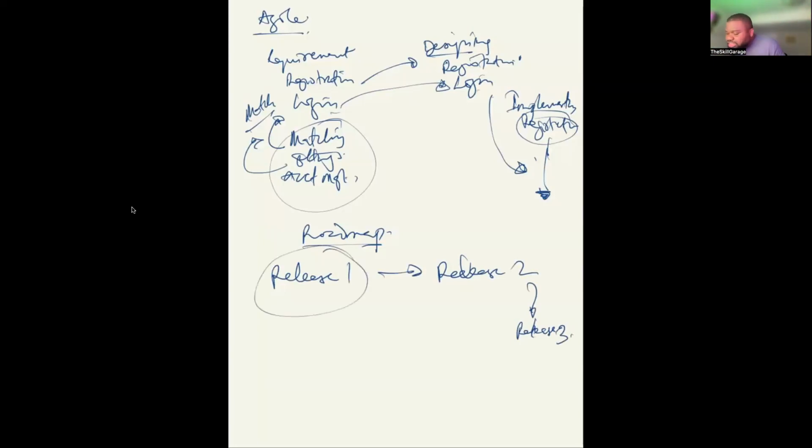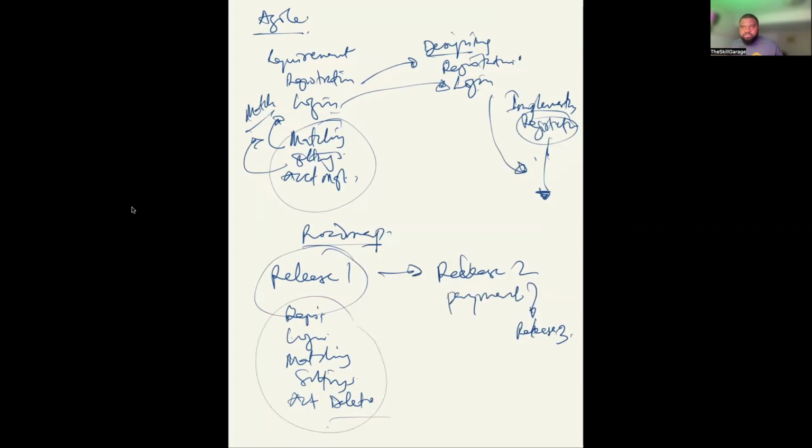So they will now focus on release 1, which is maybe the registration, the login, the matching, okay, and then the settings. And maybe in the account management, they will give you delete, because they should give you the ability to delete. Maybe they will not give you other things first. And maybe the ability to change your profile username. Maybe that's it. You don't have the other things. At this time, they're not even concerned about payment, so they will not put payment here. They'll put payment maybe in a later release, when they have tested and seen how people are using the product.